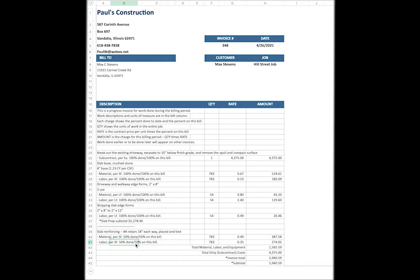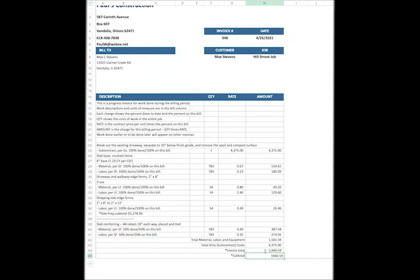Anything not on this invoice can be billed later. National Estimator keeps track of what's been billed out so far and what hasn't been billed yet. Any part of the job not done yet can be billed on the next progress invoice. If there are extra charges on the job, add those to the original estimate. These will show up as new charges in the next progress invoice, at any percent you select. One word of caution. If you make changes in an Excel invoice, be sure to enter formulas where there are totals. The totals in invoices are just numbers, not formulas.